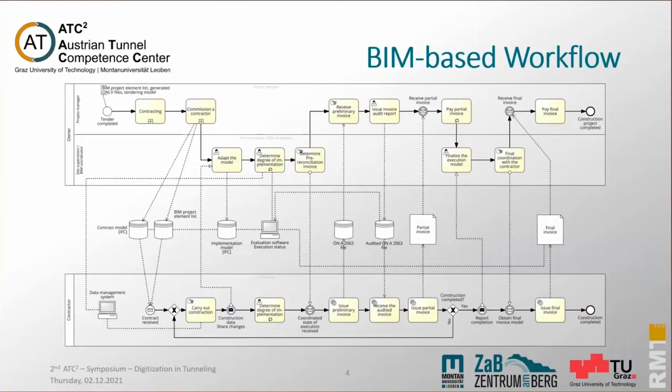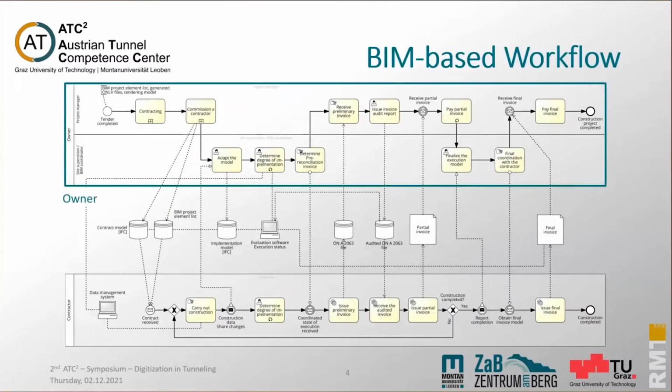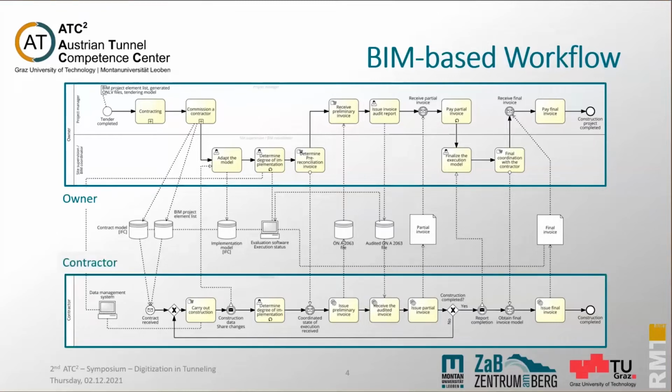So here you can see a process diagram of invoicing as we see it in general in the future of construction. The two depicted lines present the task of the owner and the contractor during the construction phase. I don't want to go too much into detail, but it's important to mention that not all billing items, as we also heard from Nina Eder, we will get in future from the execution model because they are not element-based.